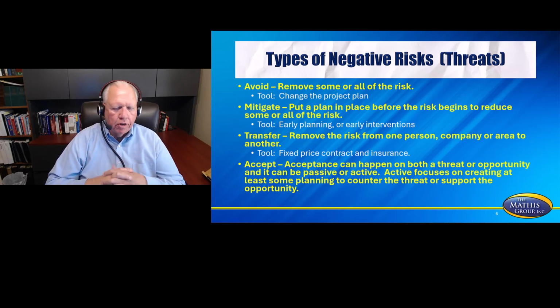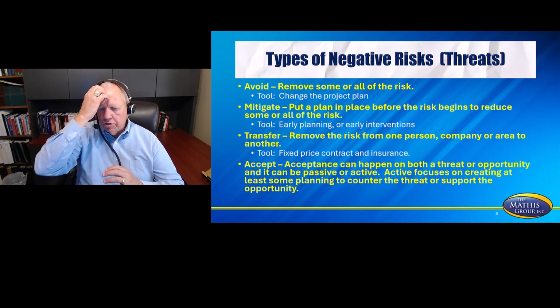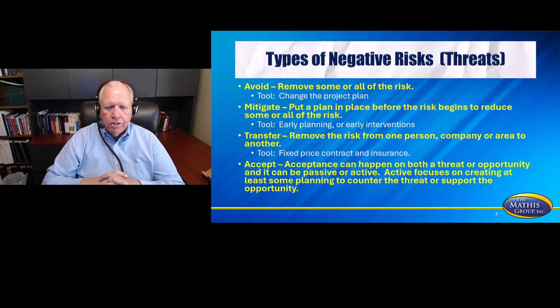Acceptance is another piece. You can have passive and active acceptance. Active acceptance allows you to understand that you're going to do certain things, maybe create a plan, maybe create a checklist of certain things to watch for that risk.